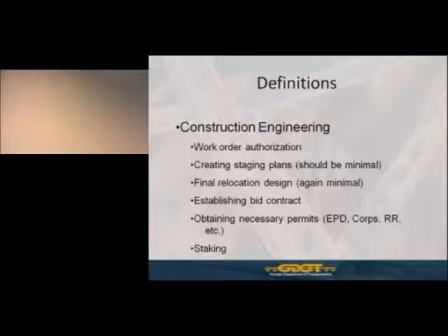You are responsible as a utility owner for staking out your facility relocations and accounting for that work. And I just wanted to clarify that here, because that question has come up several times about having the contractor stake your facility relocation work. Now, there's nothing wrong with you as a utility owner entering into an agreement with a contractor to perform that work, but that's totally separate from the roadway project, and that's between you and the highway contractor. But it is not his responsibility to perform the stake and layout for your relocation work. So just wanted to make sure that was clear.